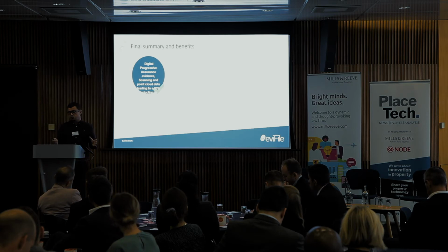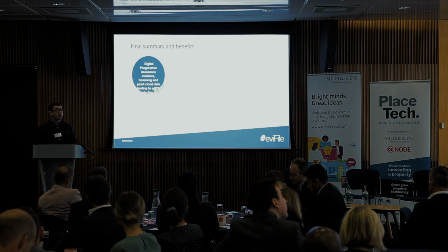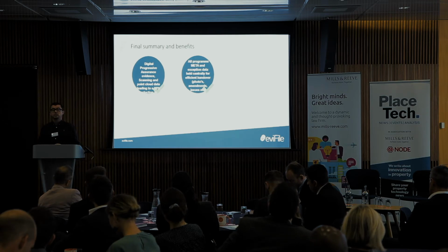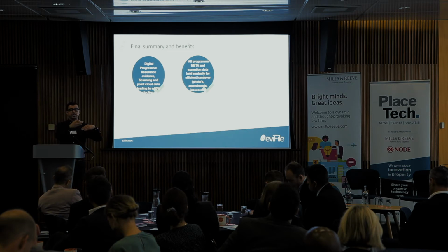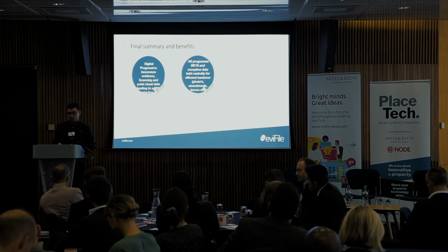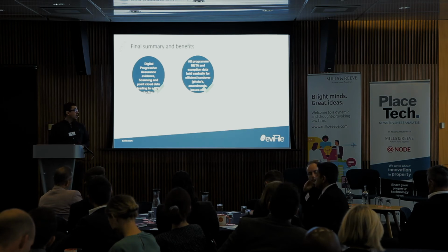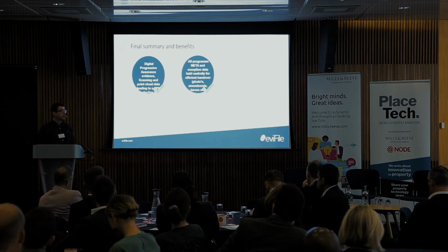The visibility and the central location of all that information enabled us to chop a lot of the cost and a lot of the issue out that would normally come at the end of the process. Everything was held in one place, so when it came to the handover of the build, we had everything from the first part of the project right to the end, including all the evidence of every step of everything that was built, which is a huge benefit when it comes to handing over to operations and maintenance, as well as, again, dispute management and issue handling. And we were storing everything from 4K drone footage right through to individual photographs of how things have been implemented and embedded on the build.